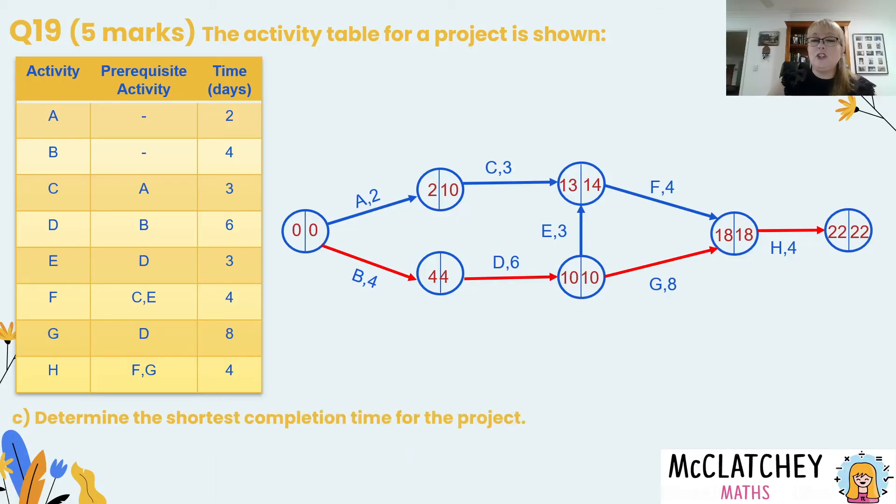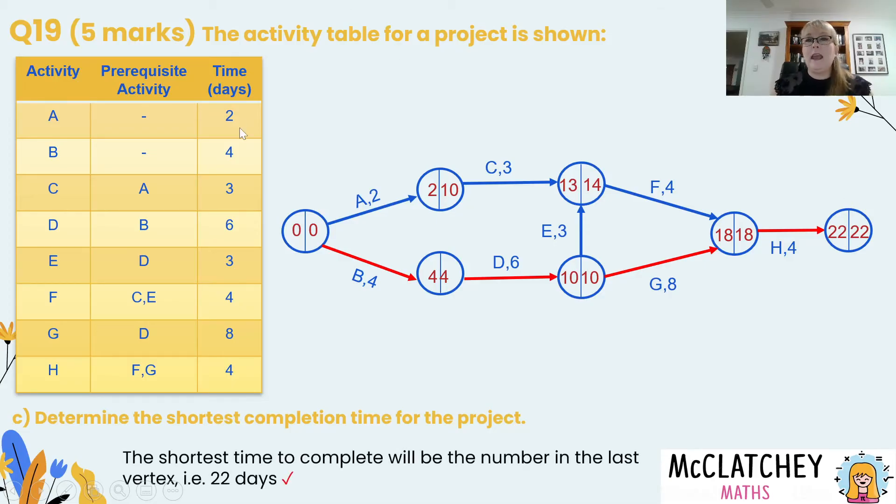All right now we need to determine the shortest completion time for the project. What is the shortest that this project can be done in? Well that's very simple. We look at our last vertex and that gives us 22. So we need to make sure we give our answer as a statement and we look at the duration. It's days. So the shortest that we can actually finish this whole project is in 22 days. That was our fifth mark.